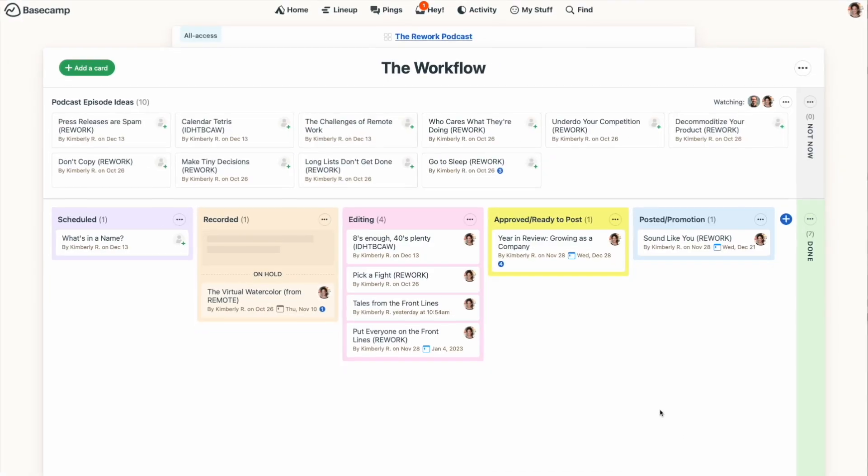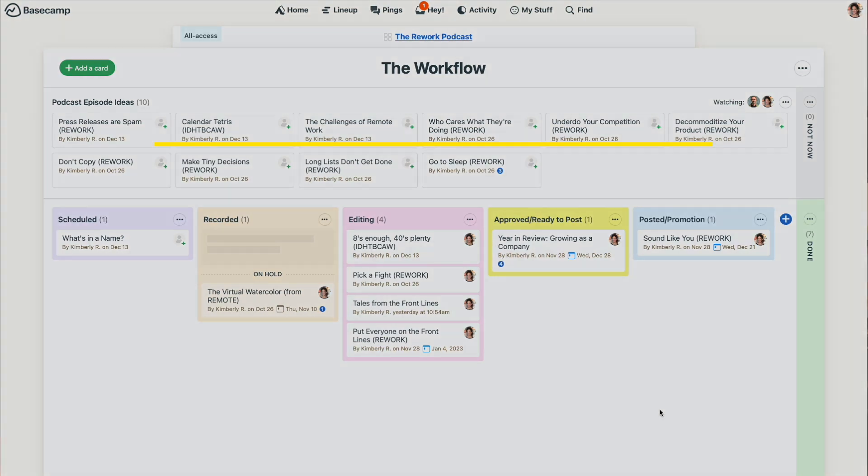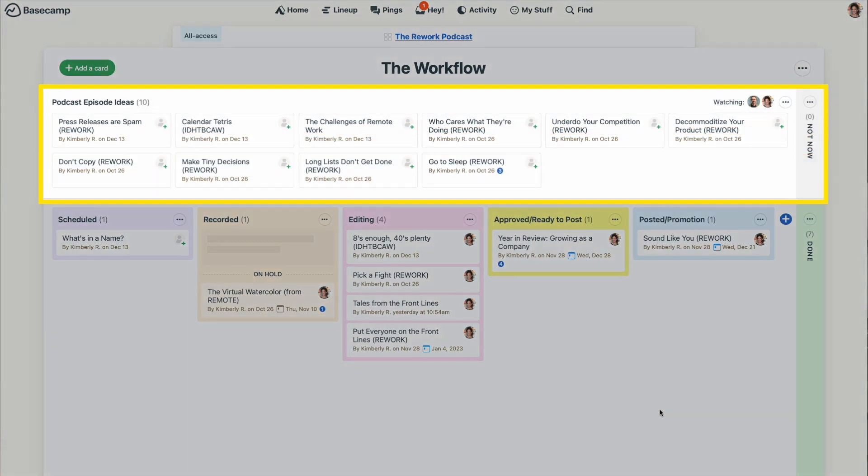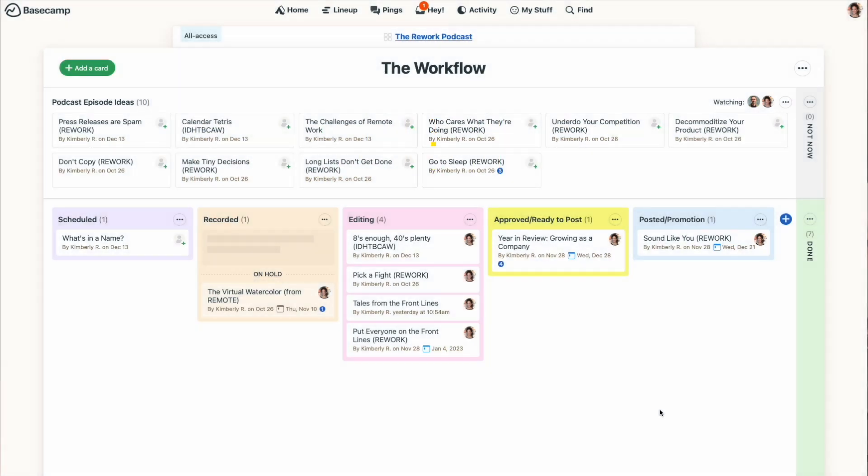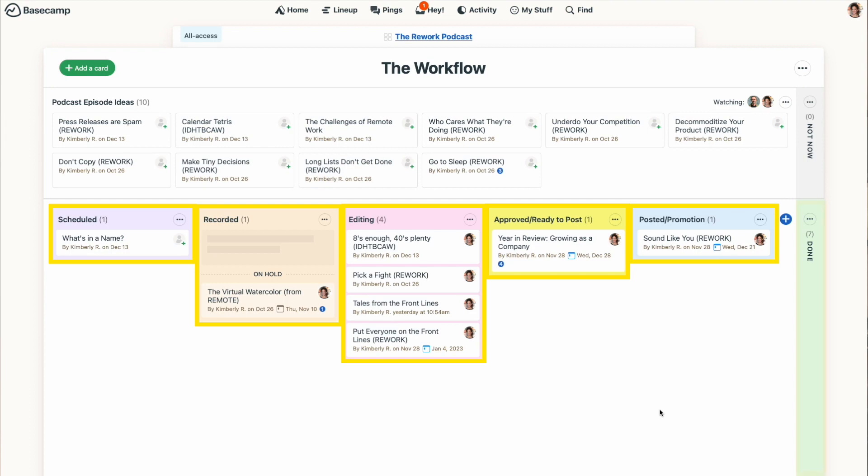An example of that is the rework podcast we produce here at 37signals. I use the card table for that so I can track individual podcast episodes from the initial idea, which goes up in the triage section, and then as the episode moves through the process of scheduling, recording, editing, approvals, posting, and completion.